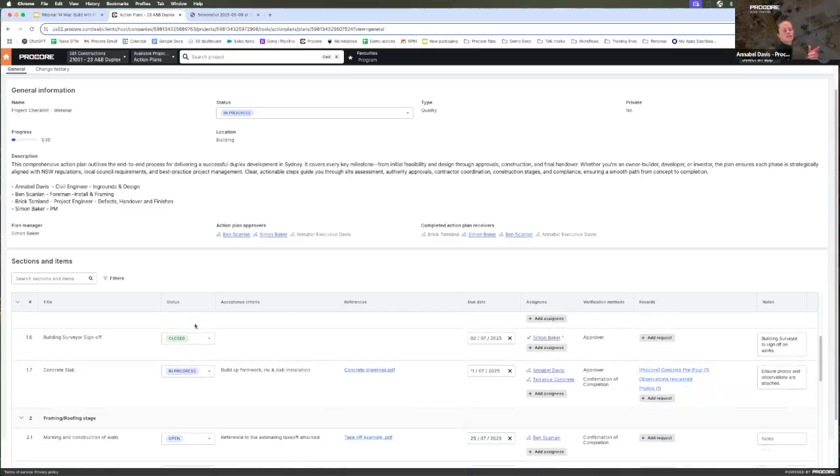Cool. It's actually really interesting that you show that because I worked on a nuclear power site and obviously they have very, very strict controls, but they didn't have that actual blocker. You knew it was a blocker, but we had an instance where we had a hold point verbally signed off, and then we poured a concrete slab. So it's pretty in line with what you're showing here today. And then we had to jackhammer up that concrete slab because the timestamp on the sign off and on the delivery dockets was in the wrong order. So it's really great that there's a functionality in there that would have probably stopped us from losing that much money on site.